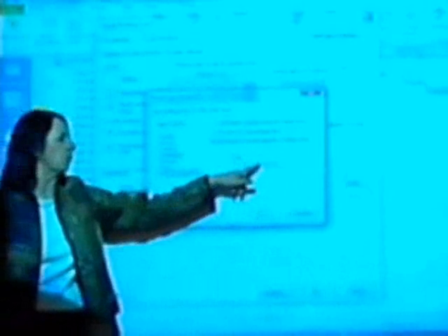And notice that I didn't always capitalize, and it's pretty forgiving there, and we'll make those match. 7 a.m. to 11, and I click on OK. Now you always want to double check, because Saturday now shouldn't be gray anymore. When you click there, notice it shows the times right there, 7 to 11. And now we click on OK.